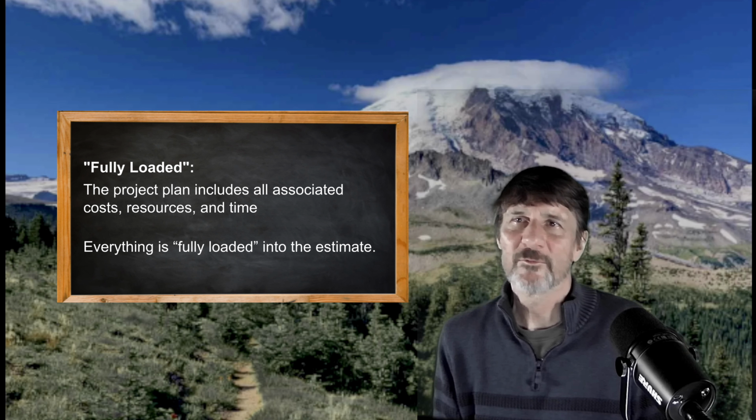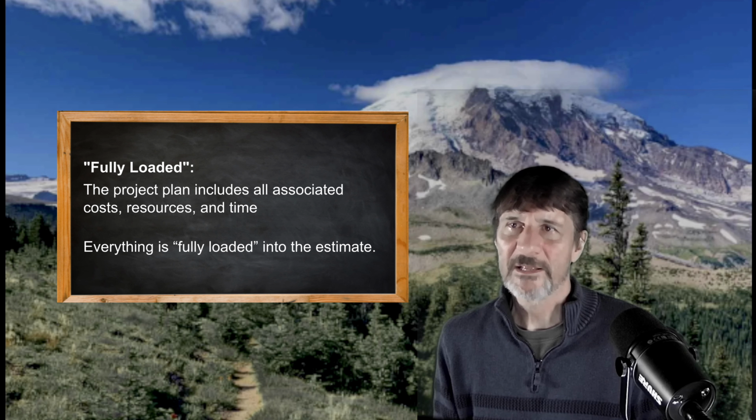So here's great news. In creating this roadmap, we have already started to establish the structure for a functional project plan. The next logical step would be to use the roadmap that we've just created, including the work packages, associated deliverables, dependencies, and individuals assigned to actually flesh that out into a more detailed project plan that's fully, quote unquote, fully loaded, which means all of the actual tasks are in there and the actual durations, dependencies, the people that own those tasks, etc.